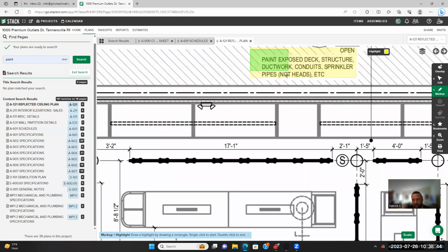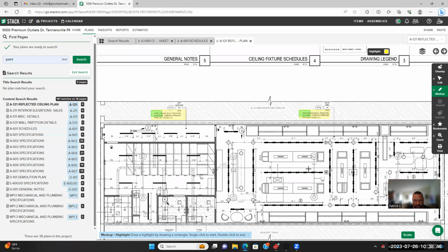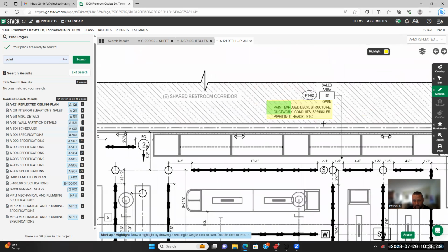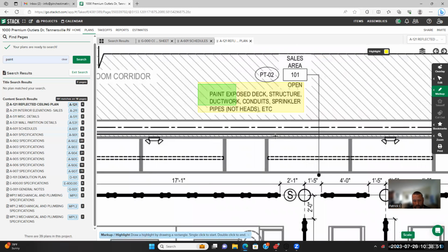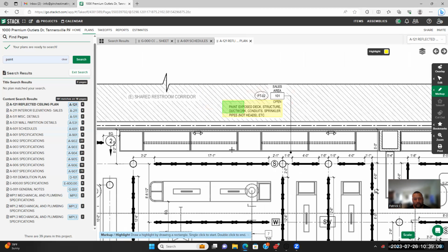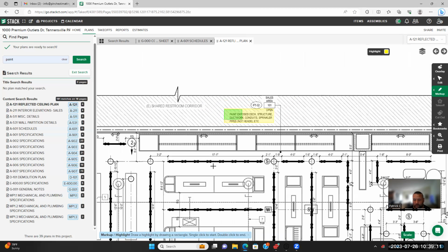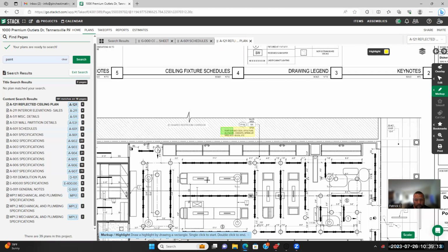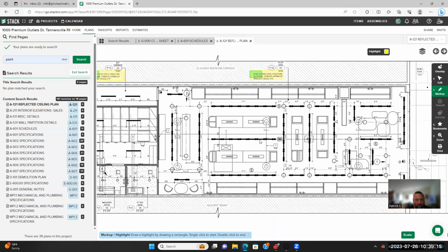Of course, you don't paint the sprinkler heads. What I would usually do when I had my own business doing this, before I got into full-time estimating, is I would use tinfoil. I'd bring a roll of tinfoil in there and just squeeze it around those sprinkler heads. That's another construction estimating tip if you didn't know that. That way, when you're spraying it out, sprinkler heads don't get painted.